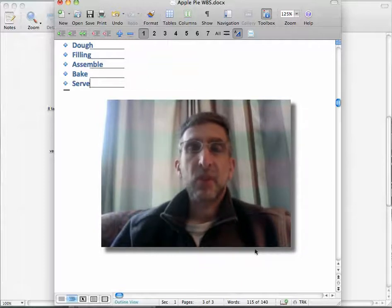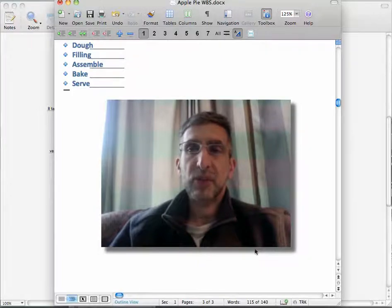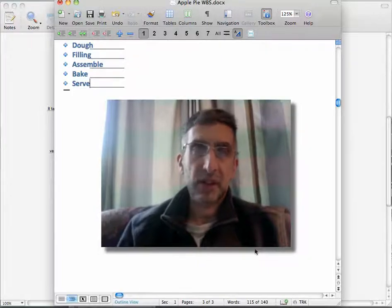But it's very important when working in the Work Breakdown Structure not to include any time factors or schedule at this time.